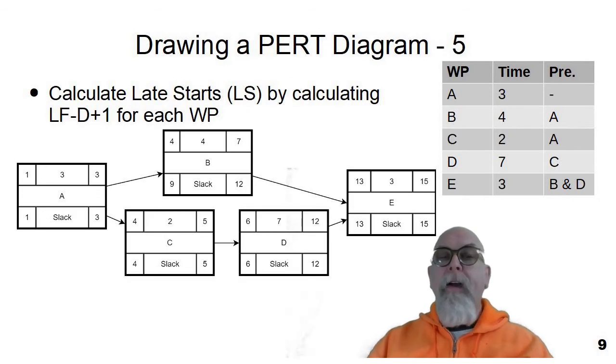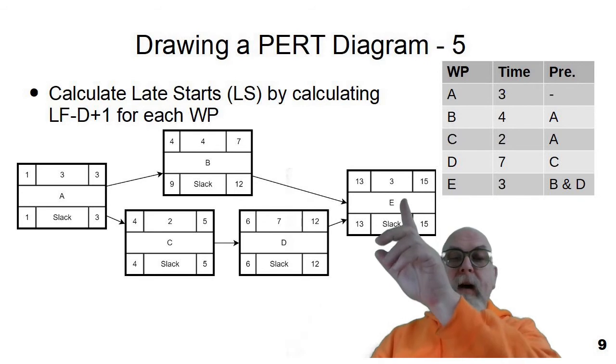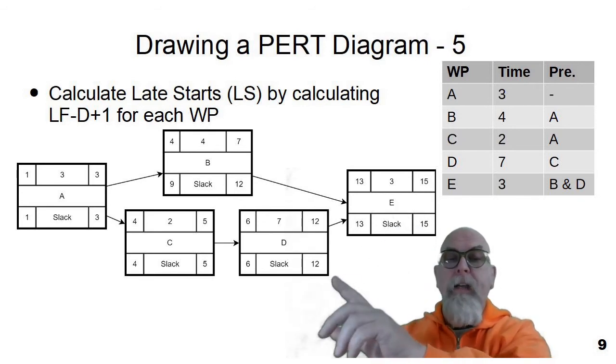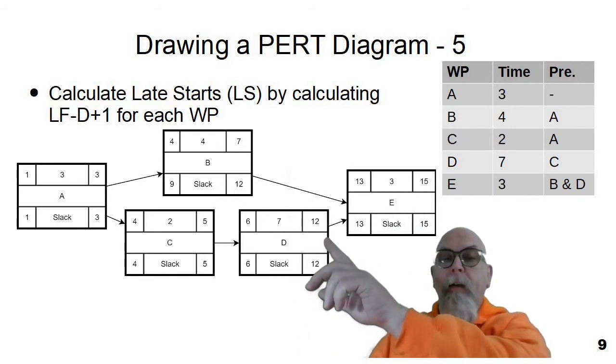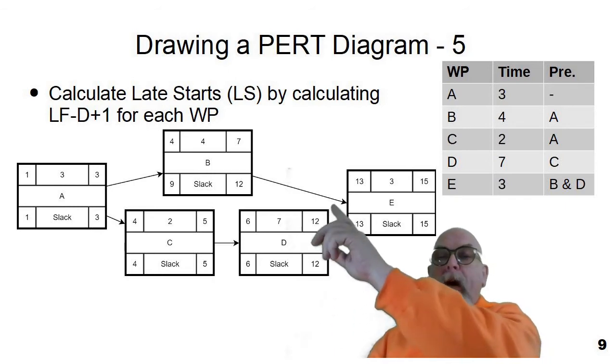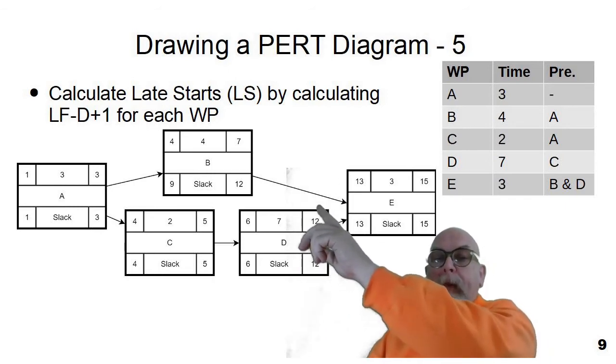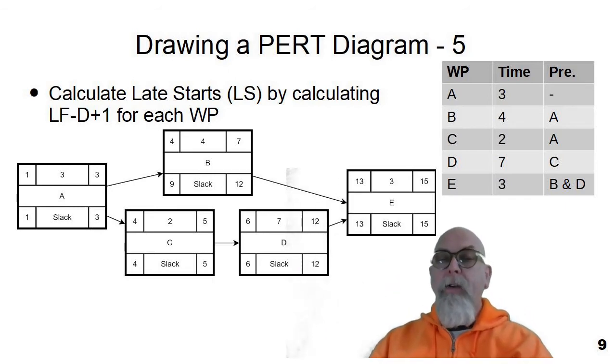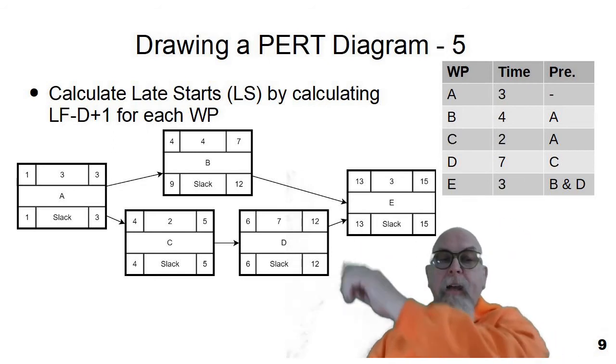Now that we've calculated late finishes, let's go through and calculate late starts by using the formula late finish minus duration plus one for each work package. So you can see fifteen minus three plus one is thirteen, twelve minus seven plus one is six, twelve minus four plus one is nine. And you can just go through each of the tasks and populate late start.